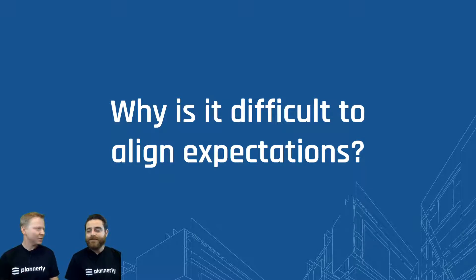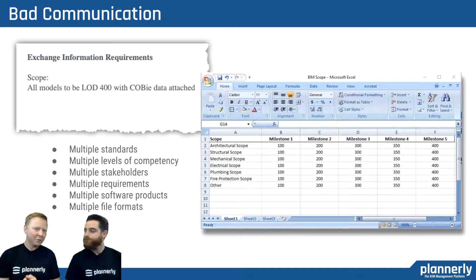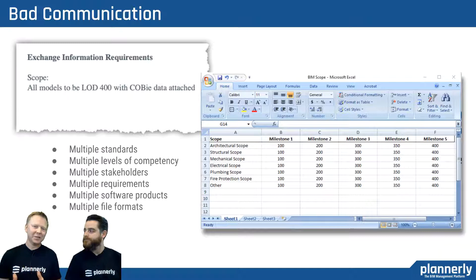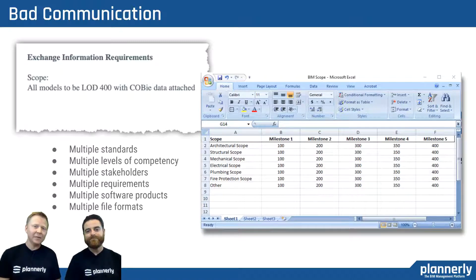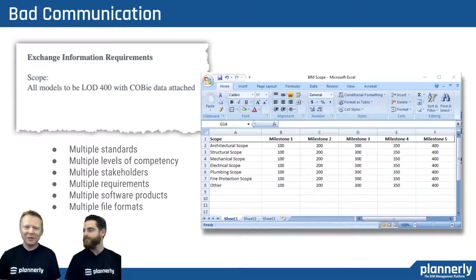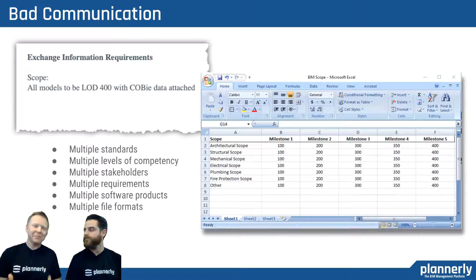So why is it so tough to align expectations? Take a look. Bad communication is a big one, and we see this a lot. Here are a couple of examples of really poorly defined scope. The first one is a one-liner — a lot of people have seen this in contracts where the owner or somebody is requesting BIM and it's just a vague statement, maybe with some kind of LOD reference. But using LOD numbers with a progression from one milestone to another — 100 to 200 to 300 — it just doesn't work like that on a project. It's a misconception that really does create bad communication about what the expectation is, what's possible, and what should be requested.